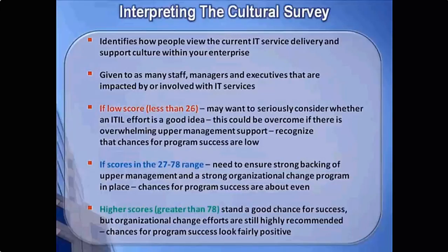The cultural survey is used to assess how much of a barrier your company's culture and attitudes might become when you start implementing your program and it starts to move forward. The results of this are really used as part of your organizational change efforts. So where barriers exist, your program plans and contingencies will have to be made for overcoming them or neutralizing them. The output of this survey will really be used by your implementation program, and it's during that organizational change effort that they will look at where the cultural issues are and try to plan actions in advance to overcome those.